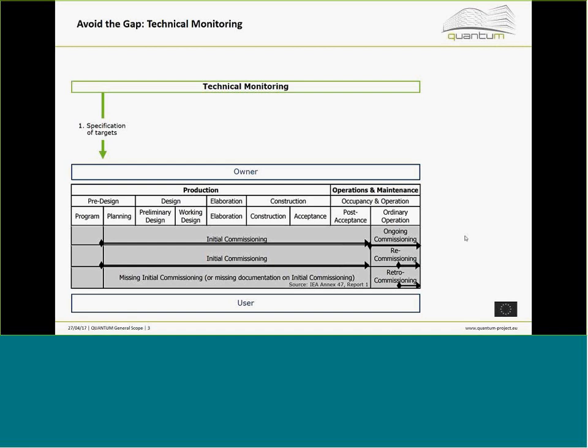What is also very important and often neglected is that you cannot just define targets — you must define how you measure them. Targets can be very vague, and it's not enough to just state a value. It is important for contractors to know how they will be tested; otherwise prices will go up and there will be insecurity in the project. So you must define the testing procedures, and then in the acceptance phase — pre-acceptance, post-acceptance, and operation — you carry out testing.